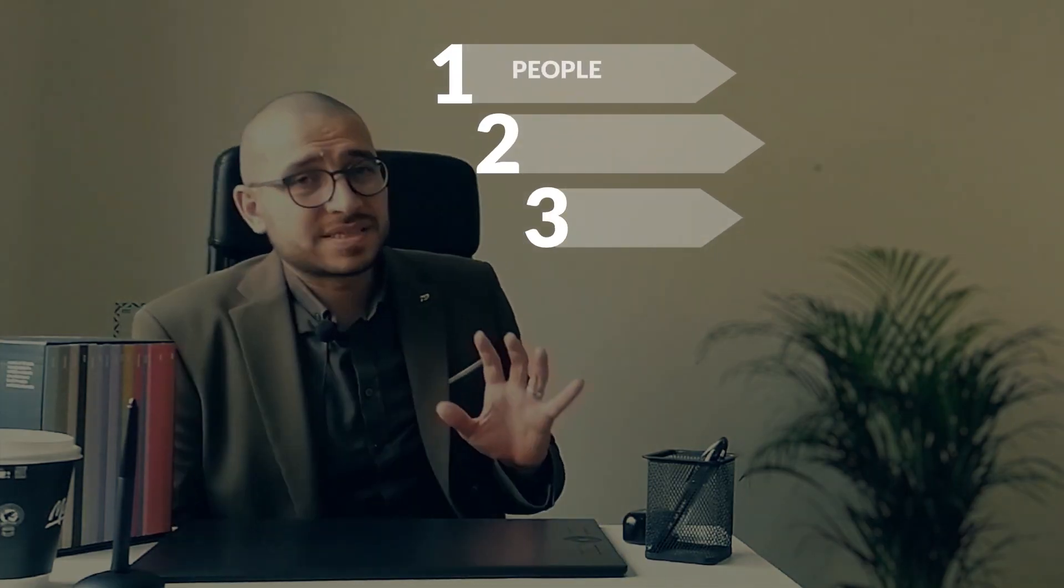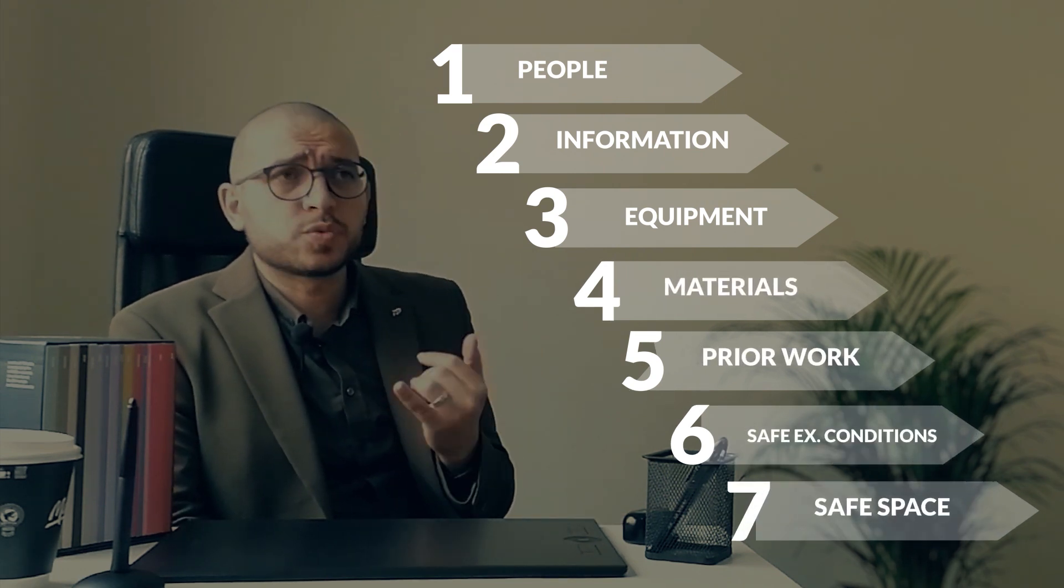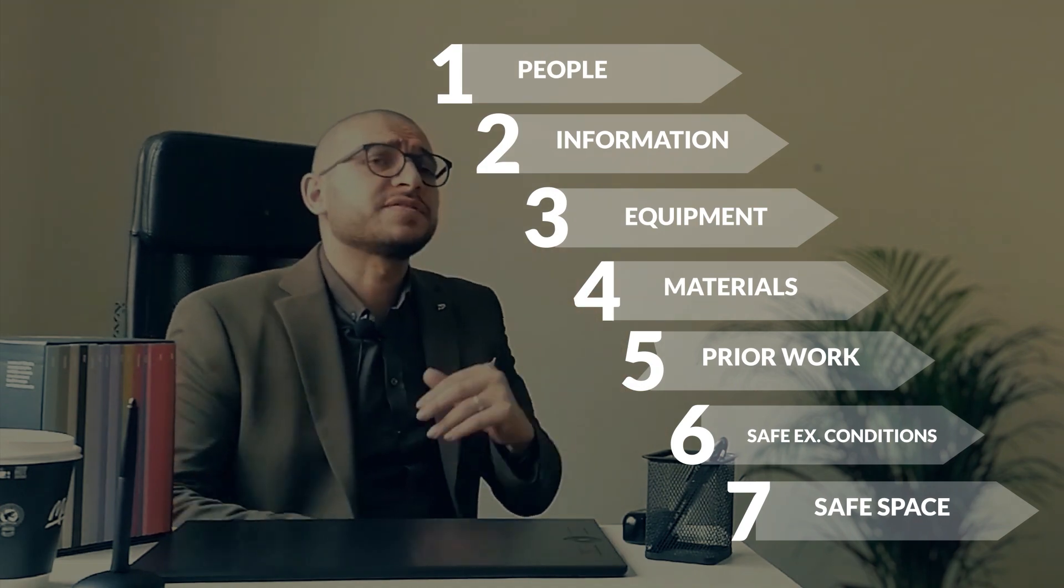There are seven flows in construction: people, information, equipment, materials, previous work safe, external conditions, and safe space.